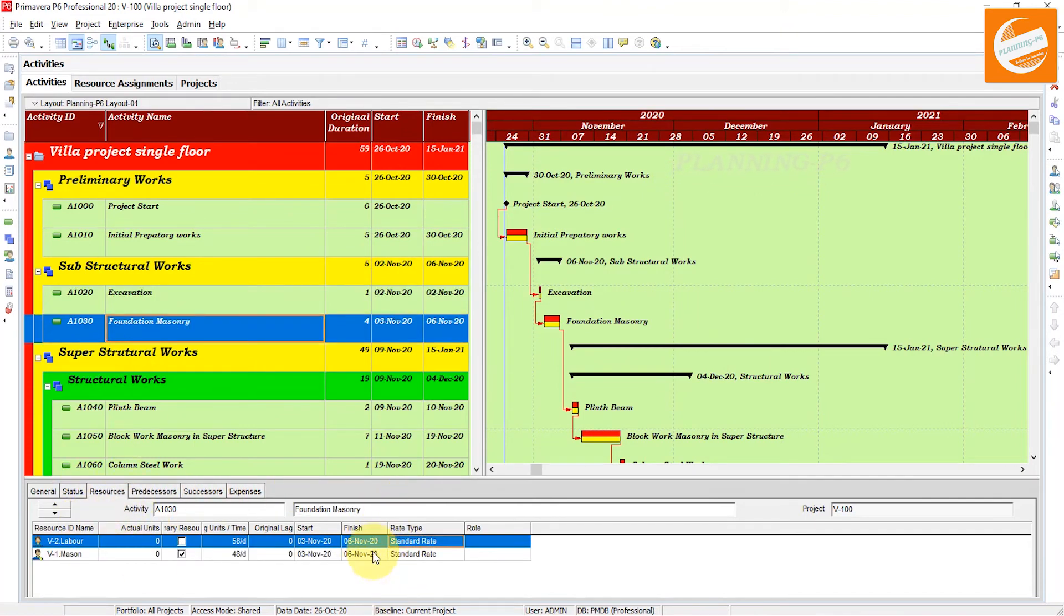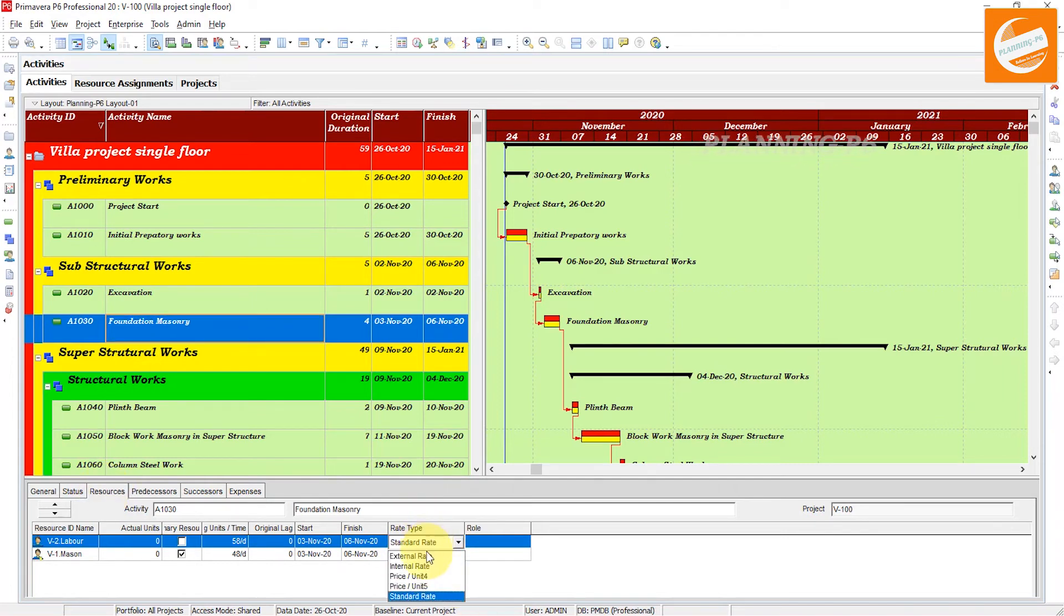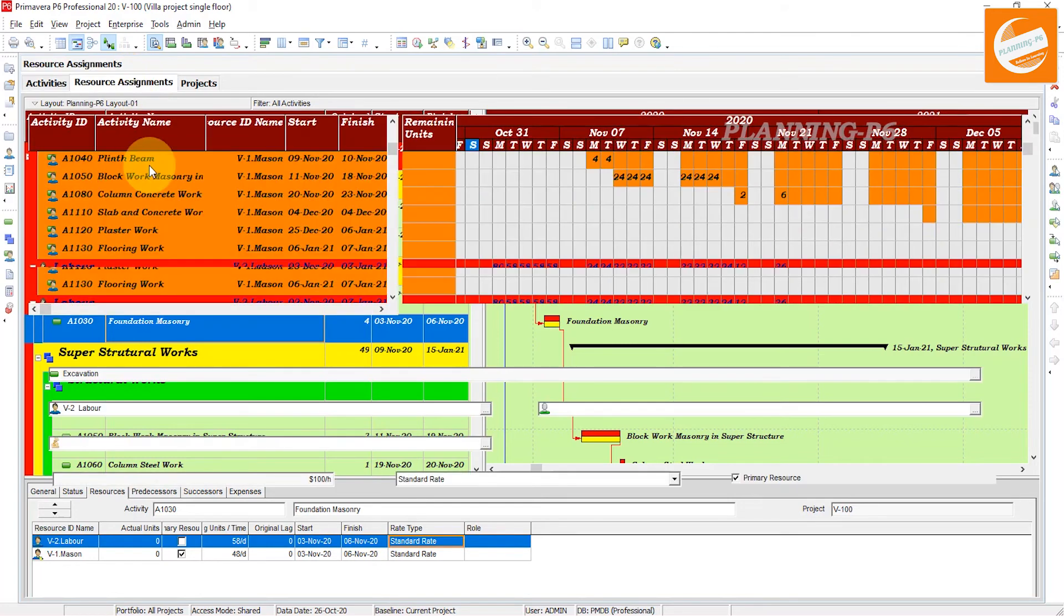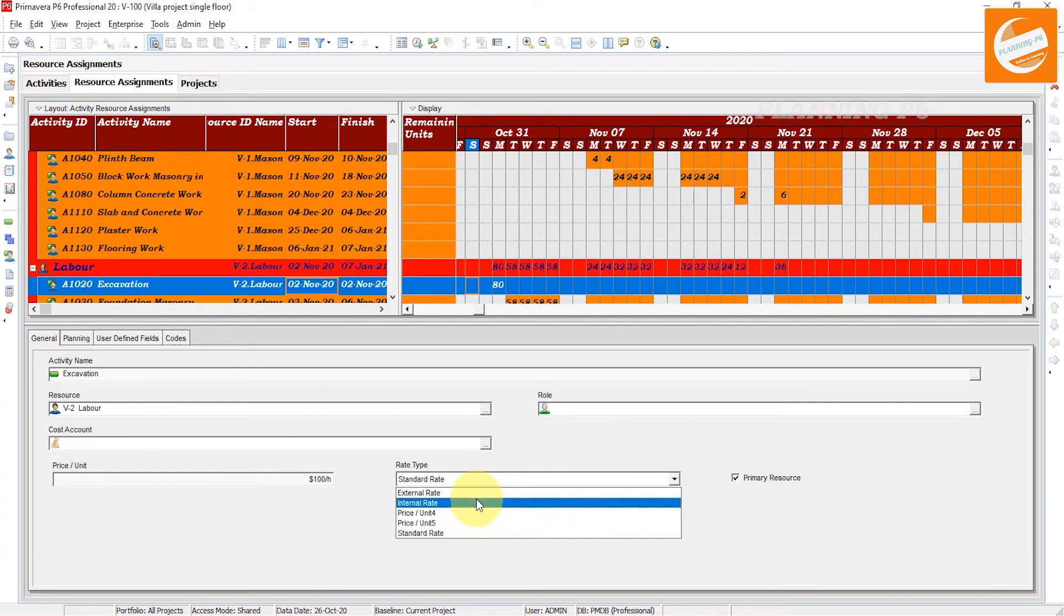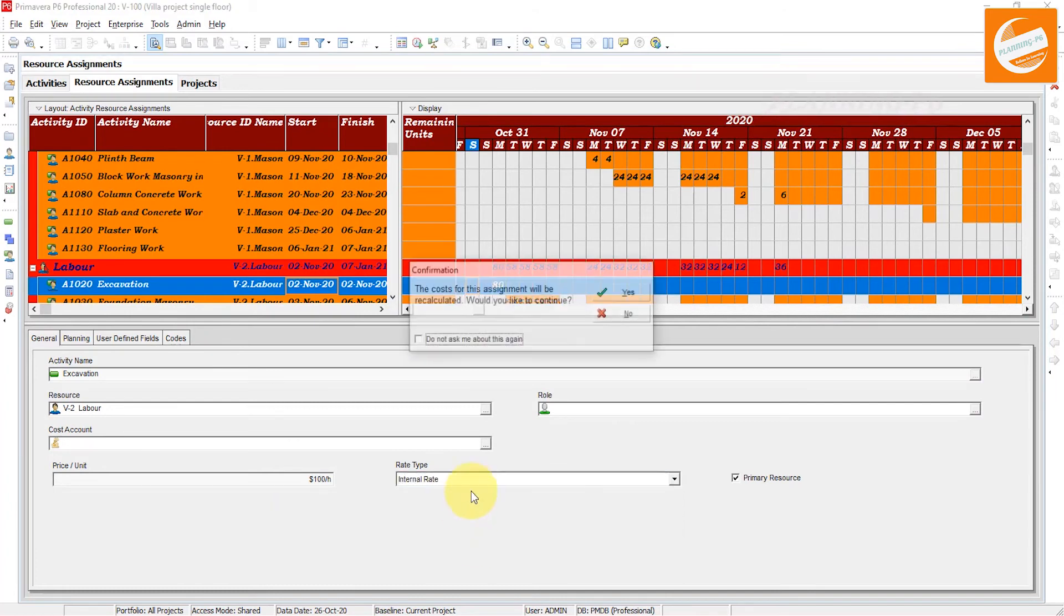And in the resource assignment tab, the rate type is here in general. The rate type is here - you can change your rate types from here.